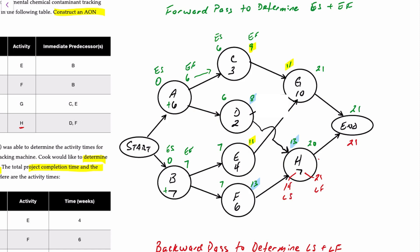For activity H: earliest start 13, earliest finish 20, latest start 14, latest finish 21. Working on activity G: 21 minus 10 is 11, so latest start is 11, latest finish is 21. G is preceded by C and E. For E: latest finish is 11, minus four is seven — so latest start for E is seven. For C: latest finish is 11, minus three is eight. Feeding back through D from H: latest finish for D is 14, minus two is 12 — so latest start for D is 12. Activity F precedes H: latest finish is 14, minus six is eight.